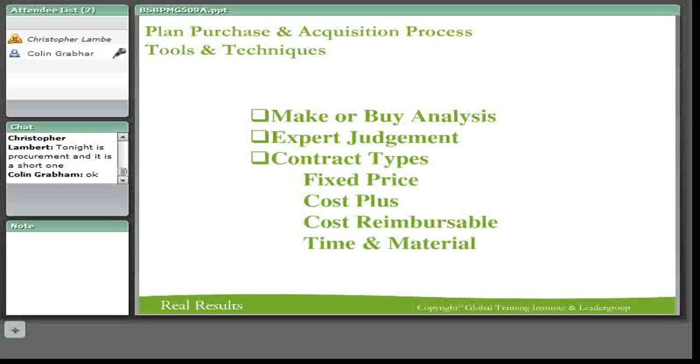That's a very difficult one. I haven't done that one, but what happens is that they tender for their part of the work. In other words, if you've got a consultant, for example, you'd pay them for what was in the quote or the tender price, and then anything else, overnights that you'd have to stay over, transport, all of that would be cost reimbursable.